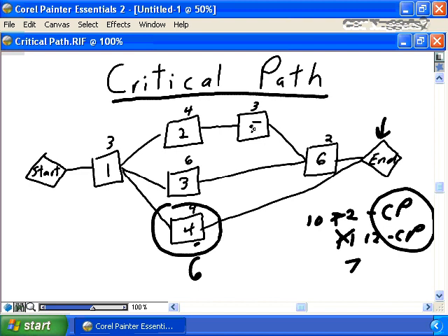To understand which tasks are on the near critical path, your project management software will also do a calculation for you, which will determine a value called slack. And the closer the slack value for each task is to 0, because tasks on the critical path will have a slack of 0, the closer to 0 the slack for a task is. In this original instance, task 3 would have a slack of only 1, which means it's on the near critical path, and the farther the slack is, in this case the slack would be 5, the difference from 7 to 12, identifies that they are not near the critical path and therefore need to be managed appropriately.